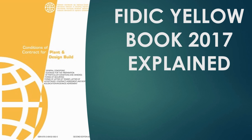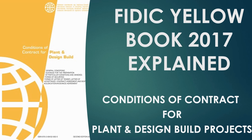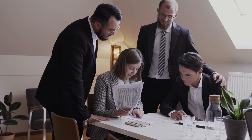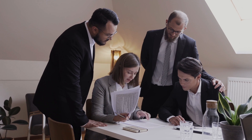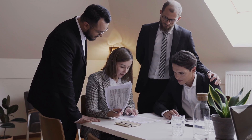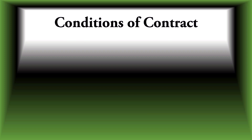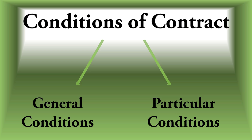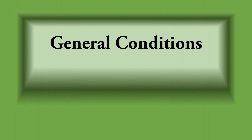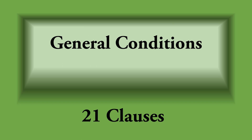This book consists of conditions of contract for plant and design-build projects. As a construction professional, it is really important to have a sound understanding of FIDIC clauses. There are two types of conditions: general conditions and particular conditions. The FIDIC Yellow Book 2017 consists of 21 clauses, and I'm hoping to explain everything in this document in a series of videos.